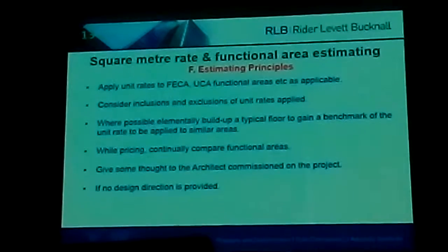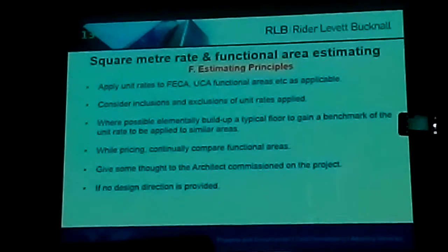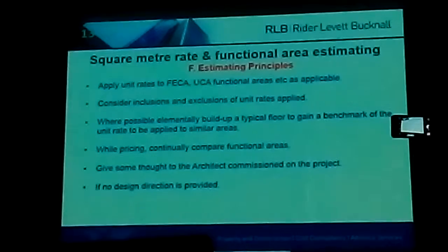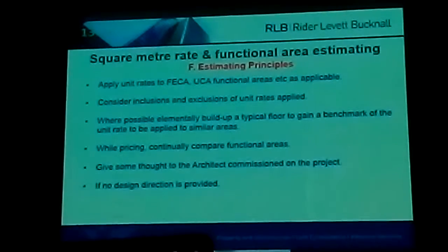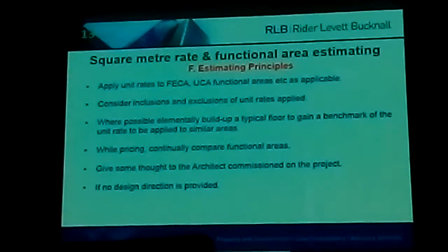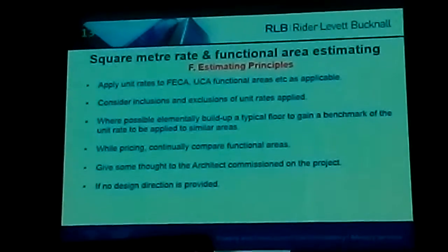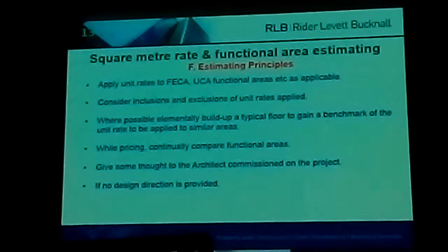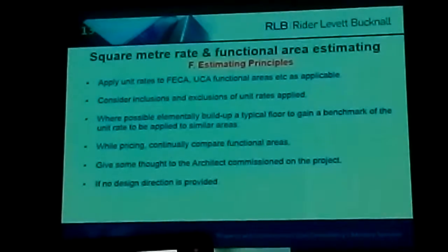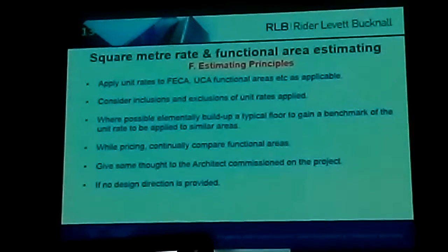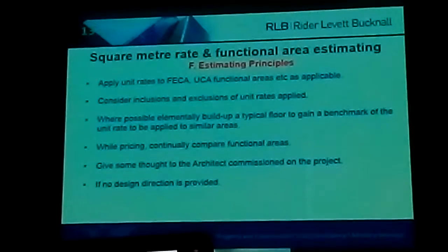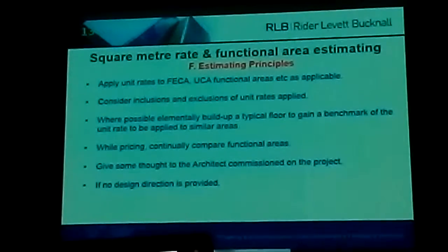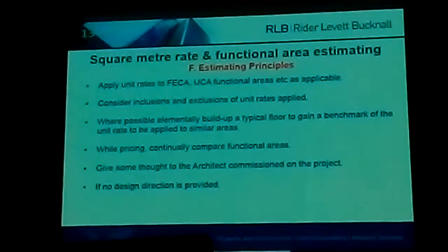Estimating principles. So the estimate is set up, areas are in, where do we go to from here? We can apply unit rates to FECA, UCA functional areas as applicable. In these rates, we consider inclusions and exclusions of the unit rates applied. Furthermore, price excluded items, as the case may be. Where possible, elementally build up a typical floor to gain a benchmark of the unit rate to be applied to similar areas.